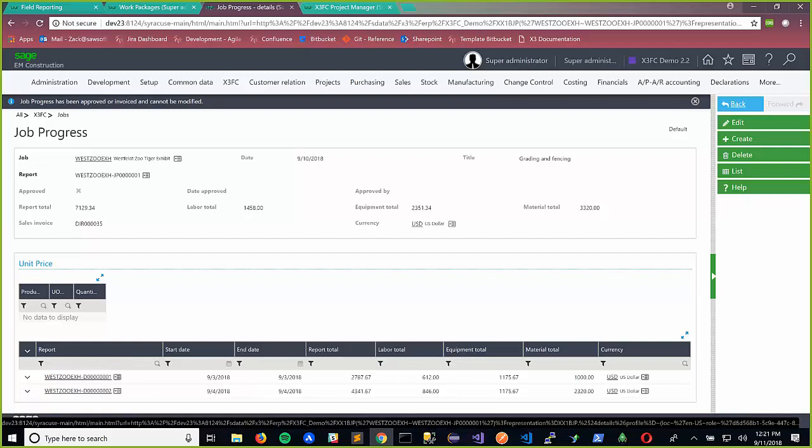So those crew reports are actually daily progress reports. We will walk down through the daily progress reports to the crew reports associated with them, to the material collections, and get all the material and the labor and equipment cost and pull those in for cost plus. Or for time and material, we'll pull the items logged as consumed, whether that be equipment, labor, or material, and look up what the sales price for those items are versus the cost when we create our invoices.